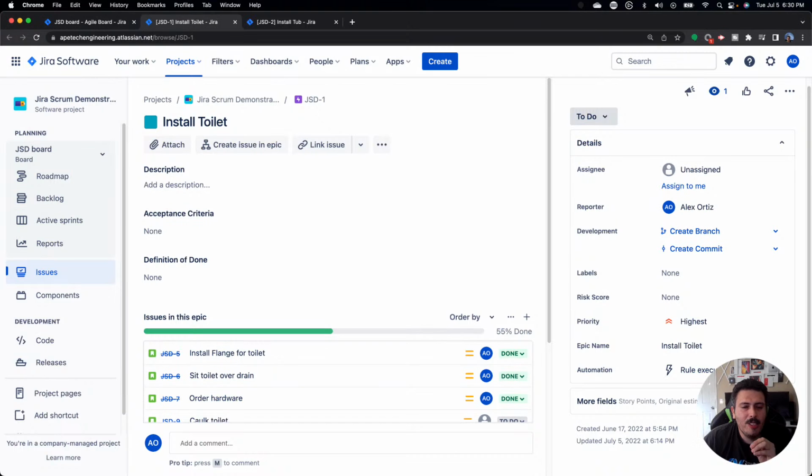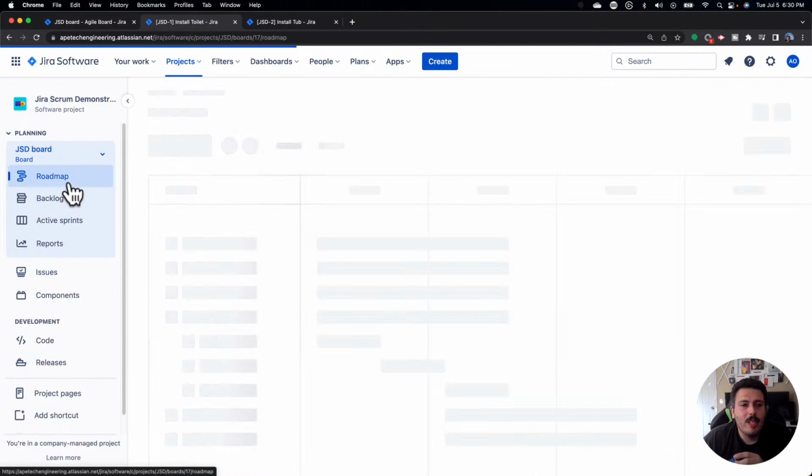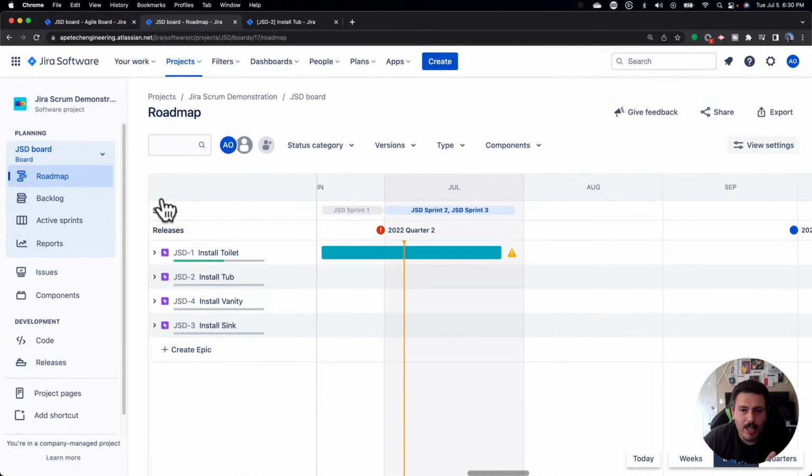And so this is where I'm going to show you a really cool trick that I like to use when I'm coaching with my teams, because even in the roadmap view here, you can't see priority. So I don't understand which one's the highest priority. With that said, though, bonus tip: you can rank here. So I can actually move these around. I don't know if you knew how to do that, but you can then start communicating to your team, okay, the epics are in the right order, so tackle them in the right order accordingly, right?